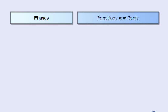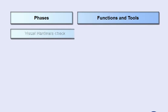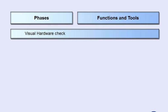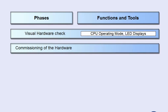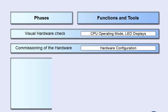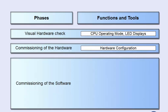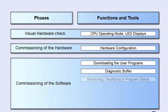The commissioning process can be divided into several activity phases in which various testing and commissioning functions are used. During the visual hardware check, completeness and installation of the automation devices are checked and subsequently switched on. The display elements on the modules give you the initial diagnostic information. While commissioning the hardware of the automation devices, it is mainly the parameters and wiring of the modules that are tested using the editor of hardware configuration. In the software commissioning phase, the functions of the user program are tested with the support of the SIMATIC manager.